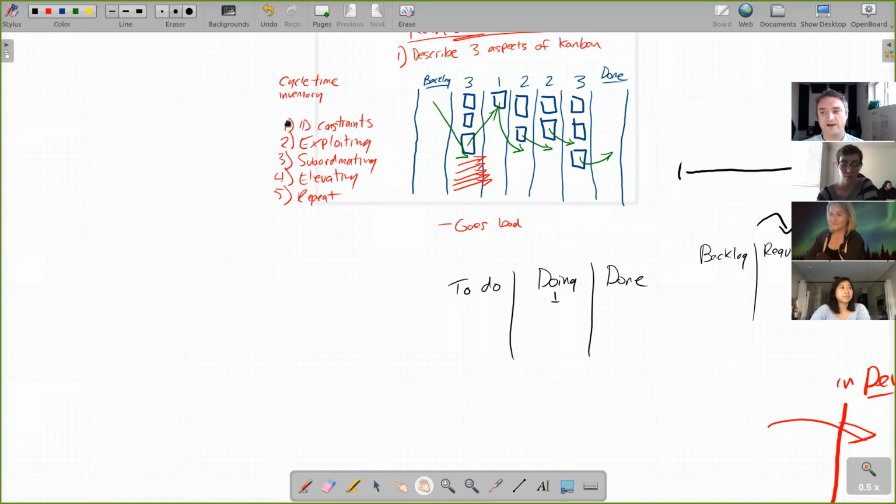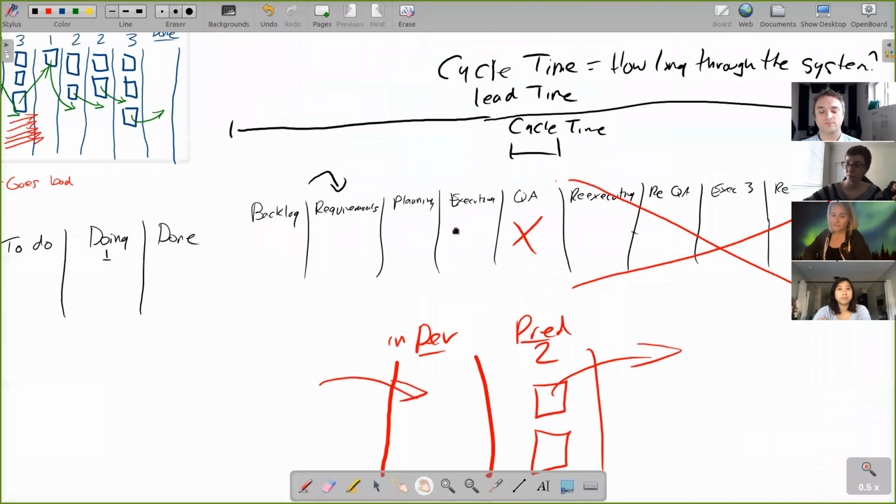So we identify whatever the constraint is. We try to make it better. We figure out if we can take resources out of other parts of the system to make it not the constraint anymore. Then last case, buy more resources to help lift it. If any one of those lifts the constraint, makes it not the constraint anymore, we start over again. Where's the new constraint?